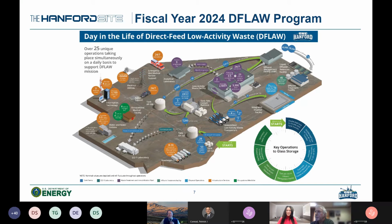Nothing for me. Can I just verify one additional fact in this line, Dana? Based on John Price's presentation, a small amount of appropriated funding below the target or the required funding each year can actually add a half a year to the schedule potentially per year. With these massive numbers that are expected to be needed from the life cycle report in the coming years, which are much, much higher than 2.6 billion per year, isn't it fair to say that we're not really talking about realistically wrapping up major cleanup activities in the 2078 timeframe? We're probably talking much, much later than that because of the funding deficit. Is that a fair statement?